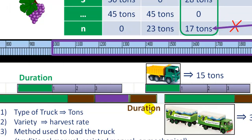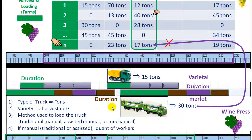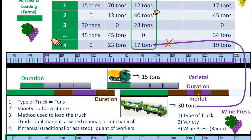In the case of the transport activity duration — whether from a farm to the winery or from the winery to the farm — it depends only on the farm where the grapes are loaded from or unloaded to. The duration of the unloading and crushing activities depends on three factors: the type of truck, the variety, and the wine press.